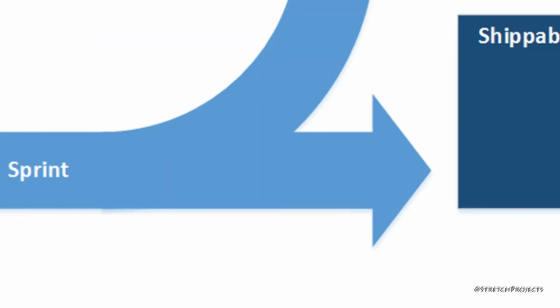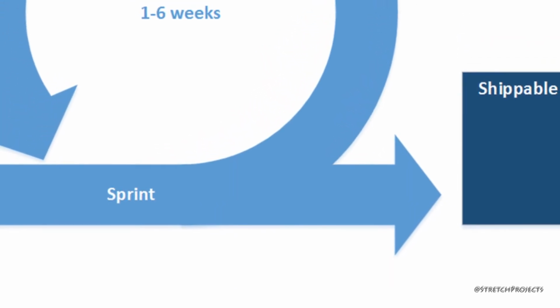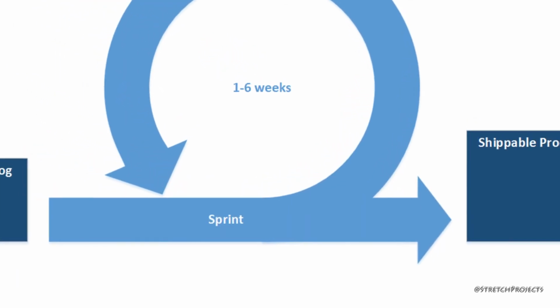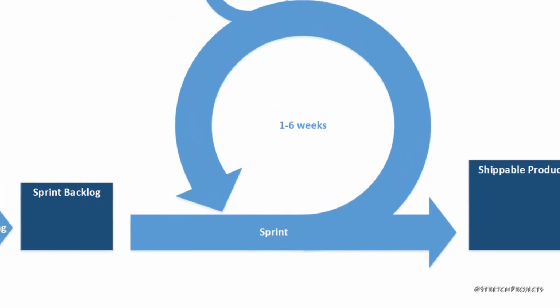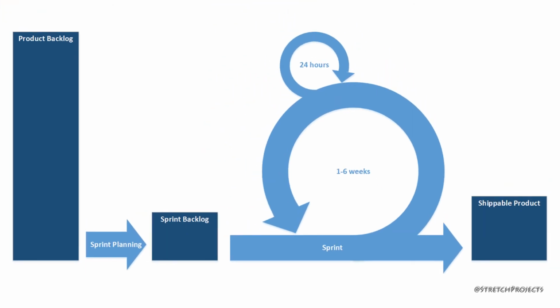If there is another sprint after the current sprint which is being reviewed, it's commonplace for a sprint planning meeting to take place immediately after the sprint review. So for example, sprint 2 would be planned immediately after the sprint 1 review, and this process will again continue and repeat itself until all of the sprints have been exhausted.